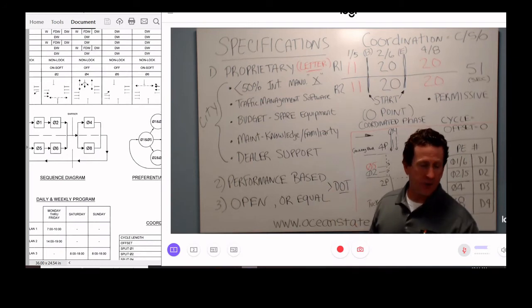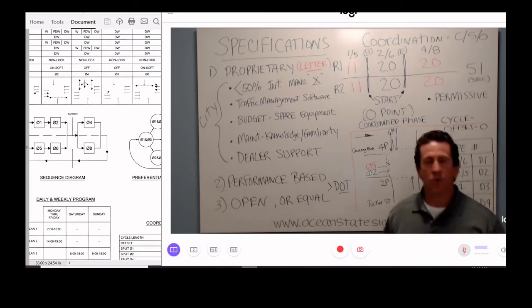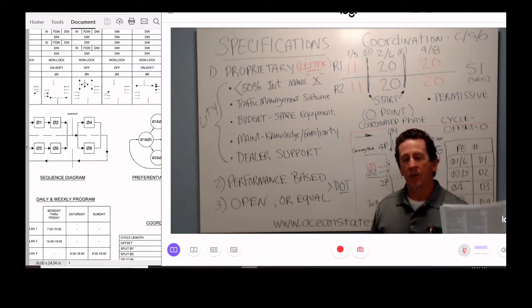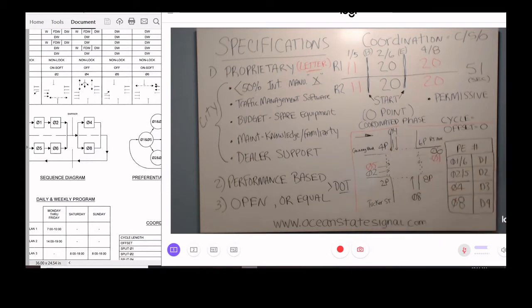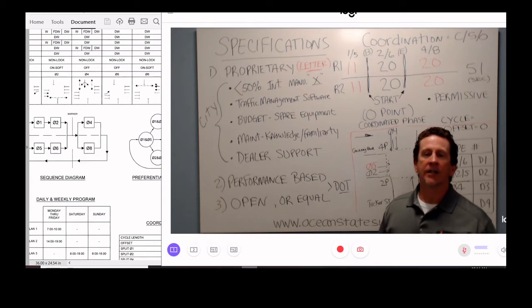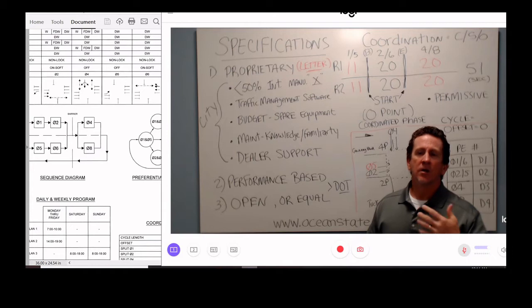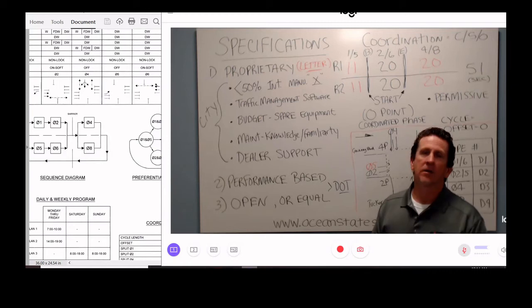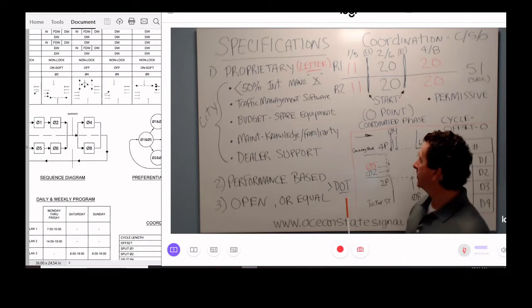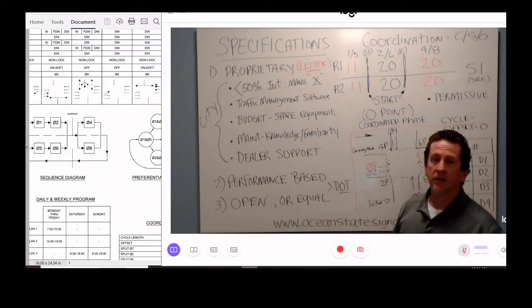And that's where this document really starts to work in everybody's favor, because at the municipal level you're generally getting city grants. The dollars are coming from different places, as opposed to DOT, Mass DOT, Rhode Island DOT, New Hampshire DOT. That's general federal highway money, so they want to know where that money's going, what it's being spent on, and if all the procurement laws are being followed. But in October, they changed that around. So we are allowed to do proprietary specs on DOT projects.